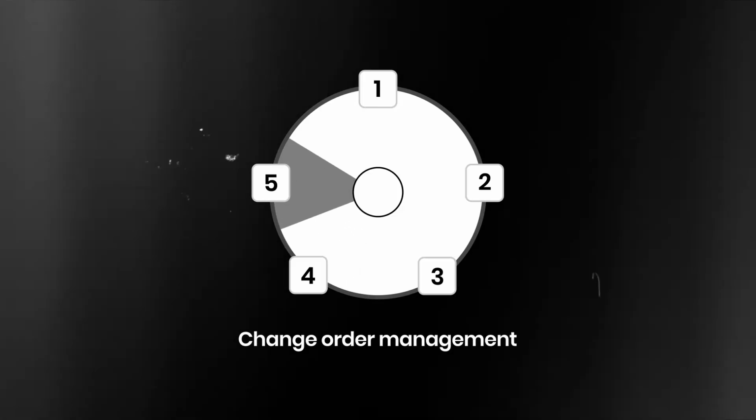Change orders connect directly to the financial records inside the module. When a change order is approved, the contract value updates and feeds into billing automatically. No more cross-referencing between your project management tool and your books to make sure a change order made it into the invoice. The paper trail lives inside the accounting system from the moment the change order is logged.